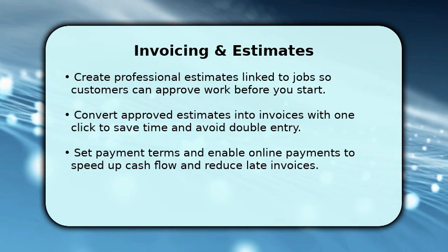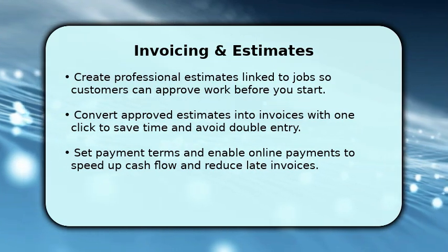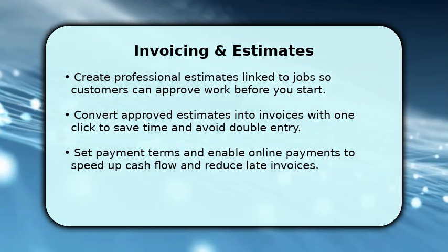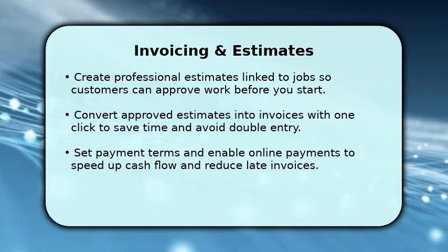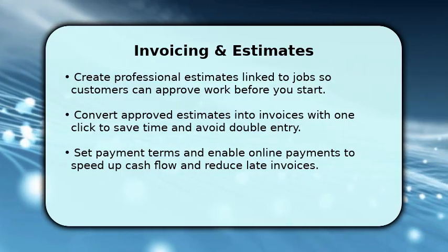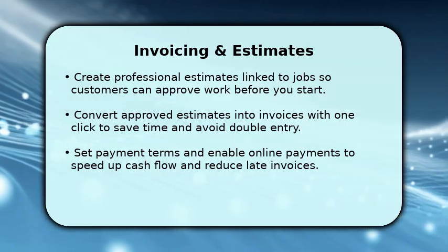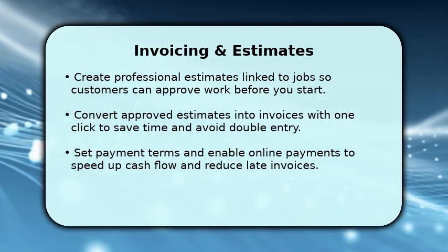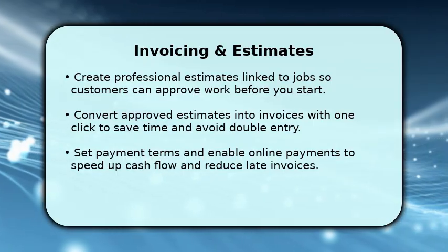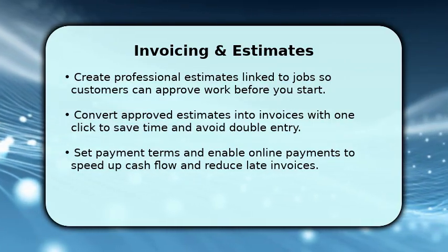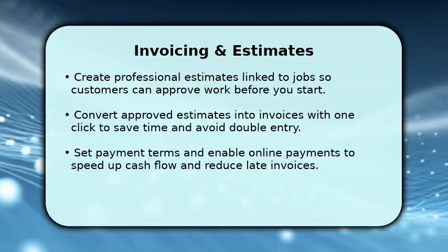Build an estimate template that lists labor, parts, and any subcontractor fees, then send it for approval. When approved, convert the estimate into an invoice and mark deposits or progress payments. Use payment terms like net 15 or net 30 and enable online payments so customers can pay quickly and you can reconcile payments without manual entry.